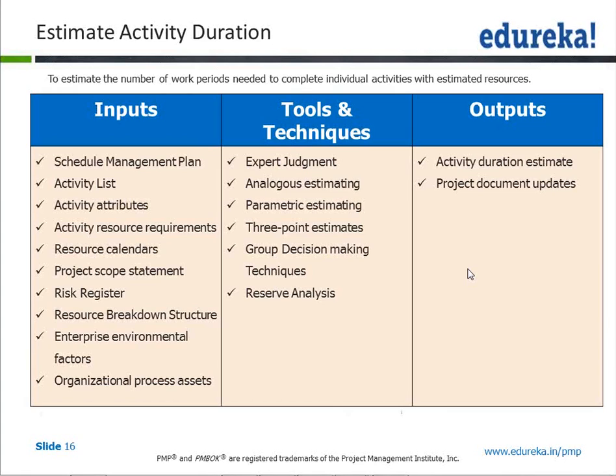Parametric estimation is similar, but remember that parametric estimation requires you to have some calculation with it. So you take past data and you have to put some figure. In the simplest manner you can say that in my past experience in that project it took 1 man year. But for the current project I feel that we have done many more projects on this and we are more efficient, so we will be able to do it in 10% less time.